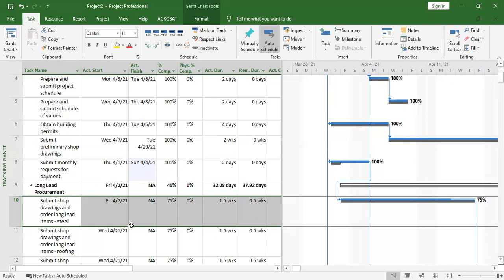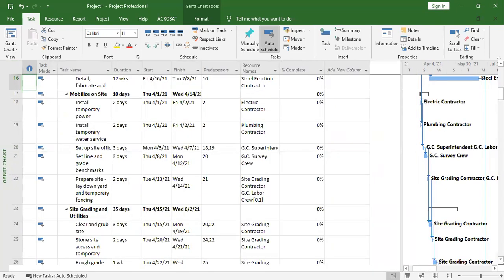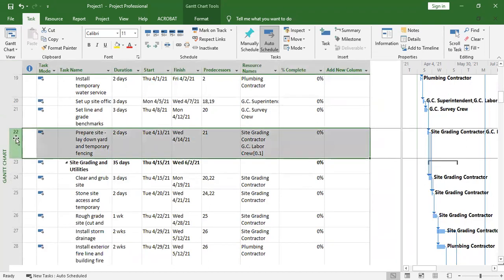So most of the times it is good to schedule activities when they are on manual scheduling. But when you're done and you're sure this is what we're going to follow, you can now change them to auto. Because when you work with auto, it will always adjust automatically. So it's always good after you've confirmed the schedule. But when you are just making it, leave it to manual.